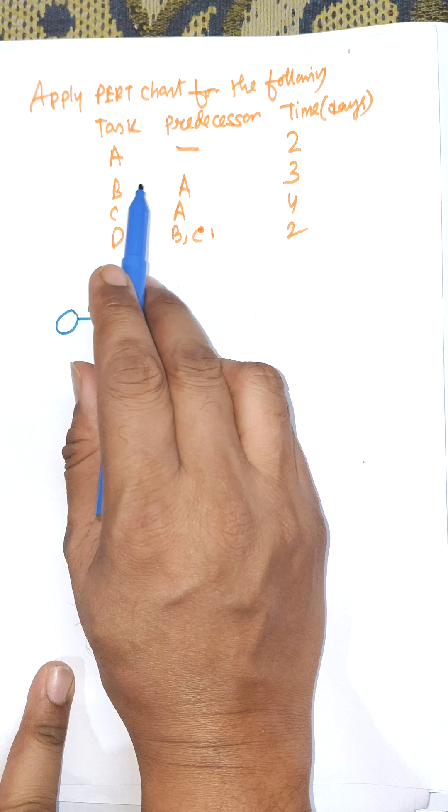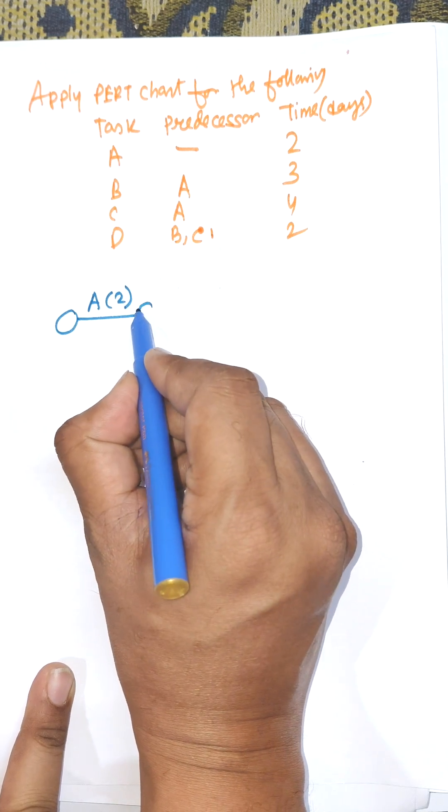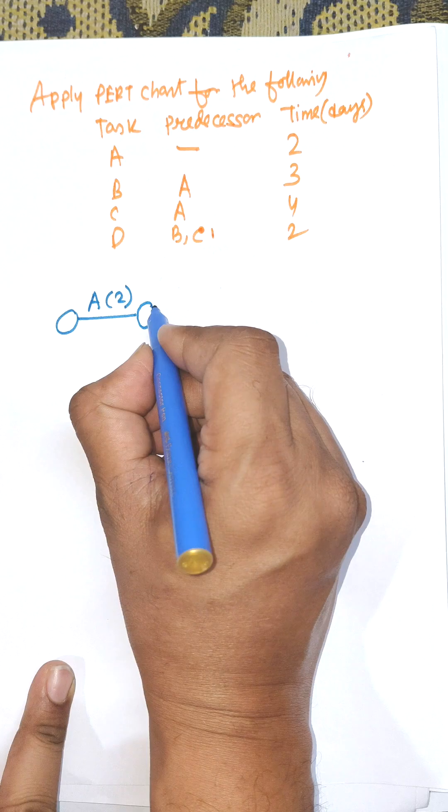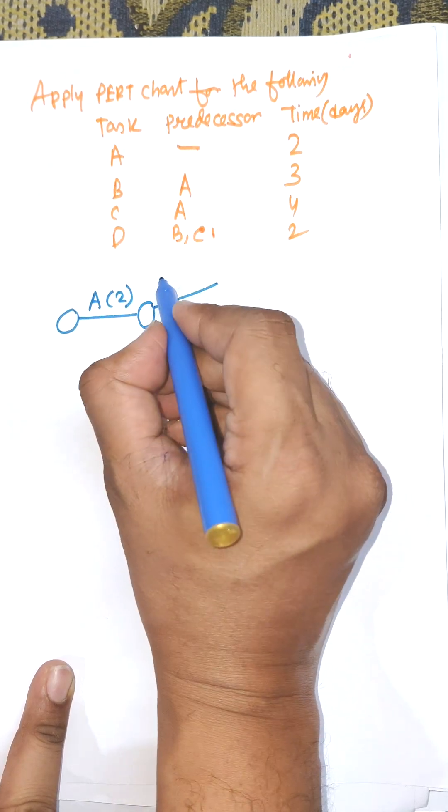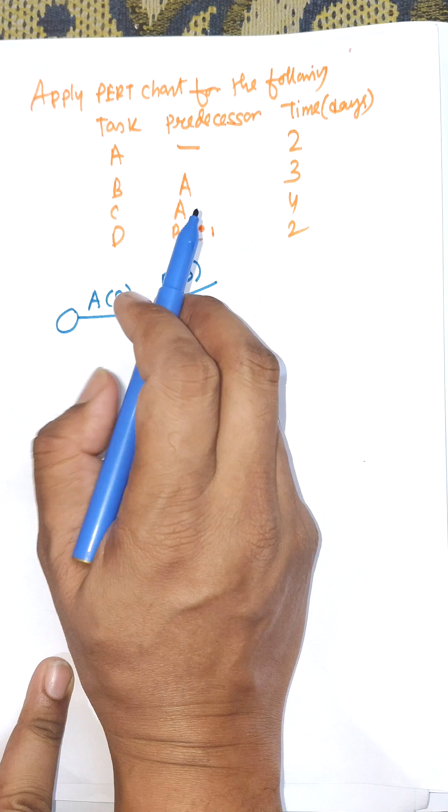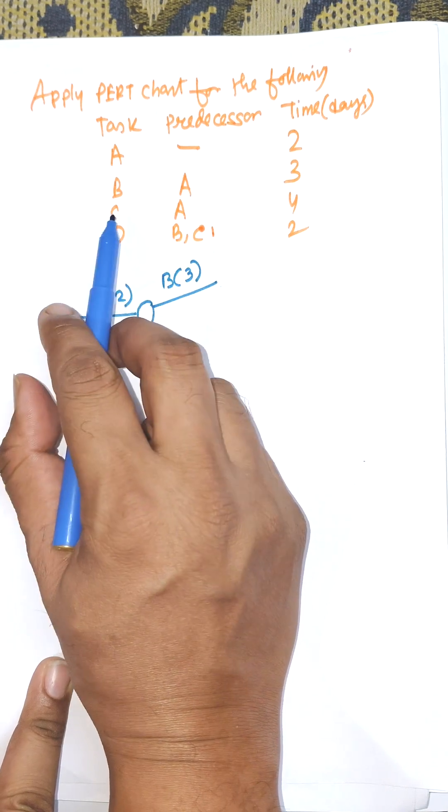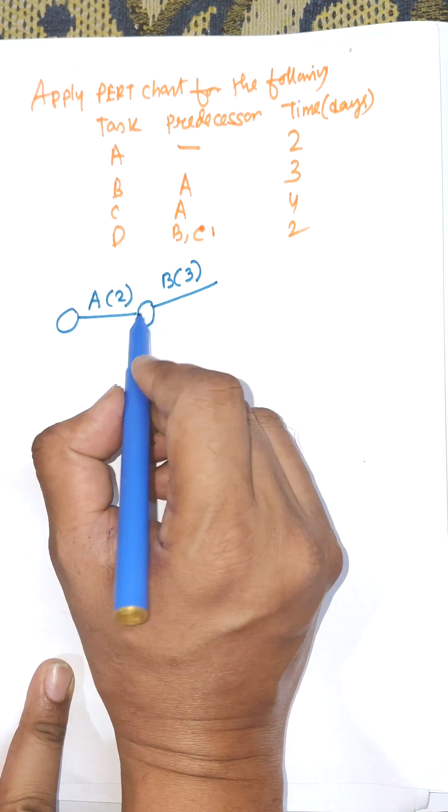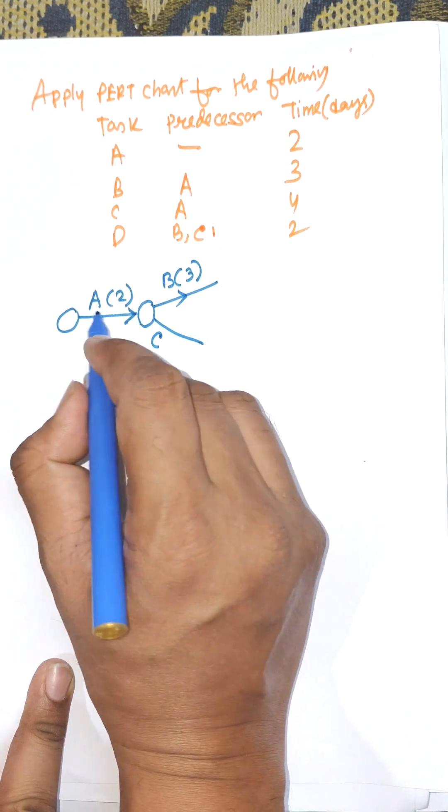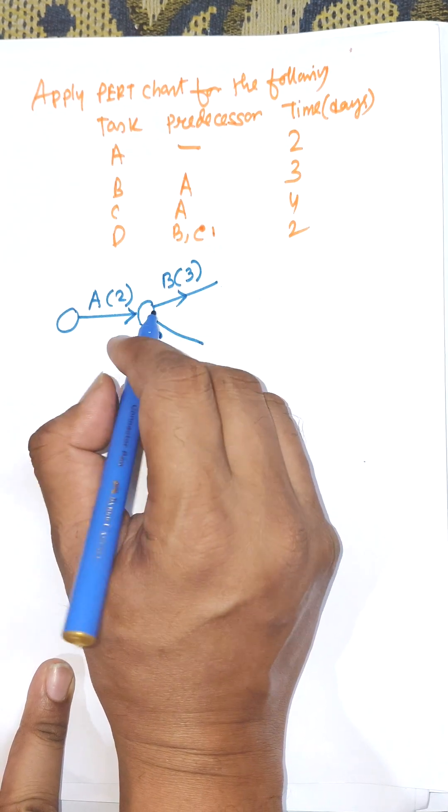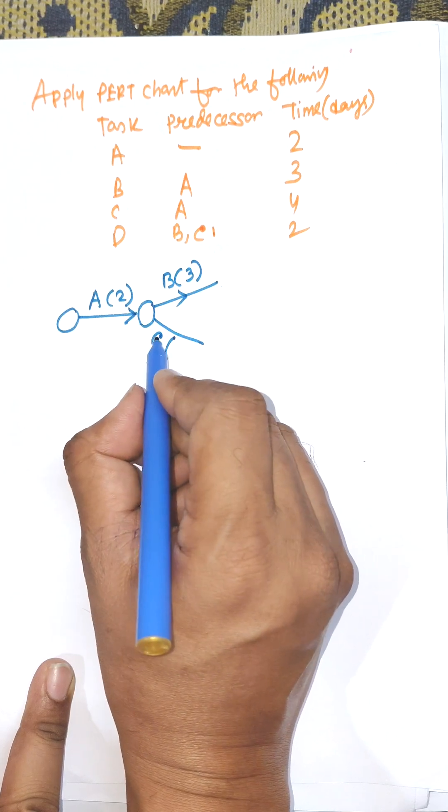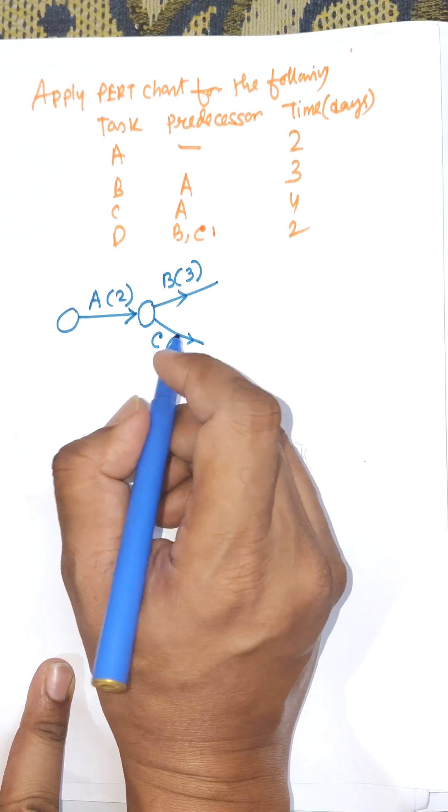We start from A, so this is the end position of A task. From here B will be executed, days for B is three. Starting for C is also, predecessor for C is also A, so C will start its execution when A finishes its execution. From this point C will further proceed to execute. The duration of C is four.